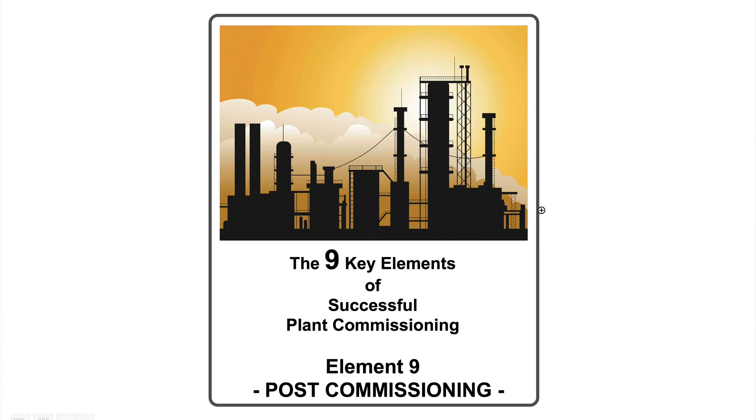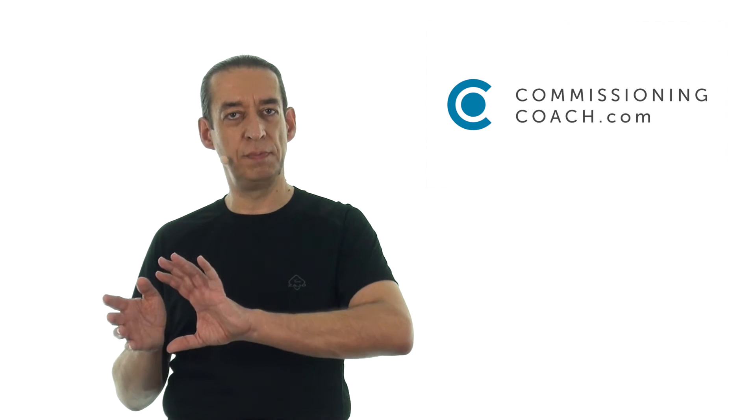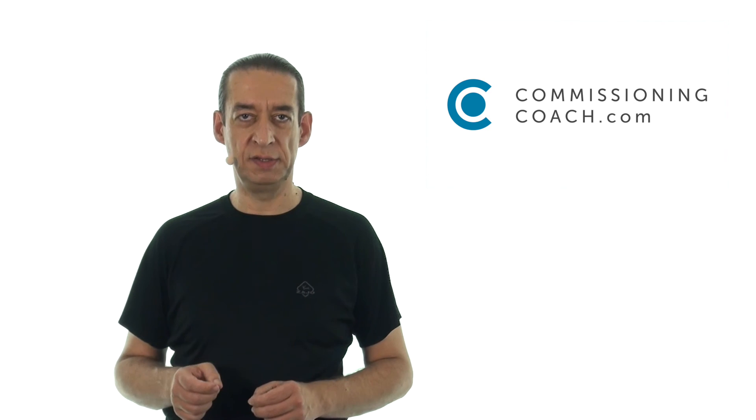This was the last video in this series, post-commissioning. This was the last step in our complete process of commissioning of industrial plants. Post-commissioning means the phase after handing over the plant from the contractor to the client. So, the plant is operated by the client. We had the final acceptance and the contractor is still there and the contractor helps the client to operate the plant and to solve outstanding punch points. And this phase can be sometimes one month, two months or even more than two years.